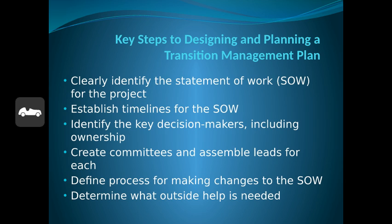So that's just an example of why having a responsibility matrix in the beginning is critical, because each person gets a copy of it and they know if they're working in conjunction with another trade, they know who to talk to, and if something is forgotten, somebody can bring it up early in the planning stages so it isn't a rush at the end. And clearly identifying the scope of the project and evaluating in-house capabilities as well as upcoming workload is another critical task.